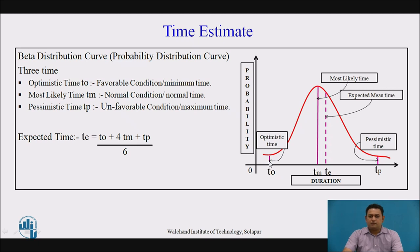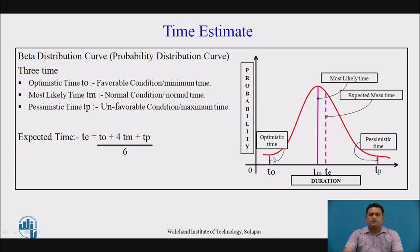On the beta distribution curve, the pessimistic time, most likely time, and pessimistic time of the particular activity are represented. When we observe this curve, the most likely time is closer to the expected mean time. This beta distribution curve is used to define the three time estimates of each activity.